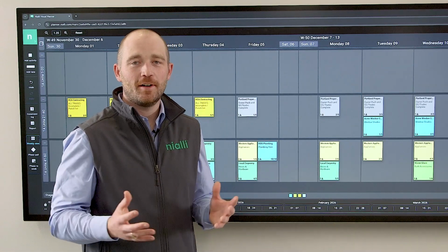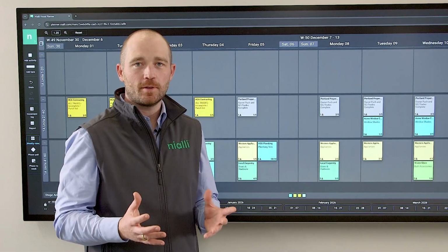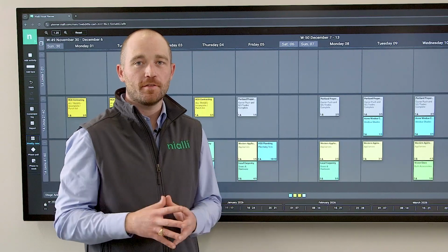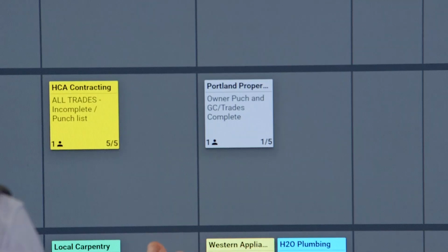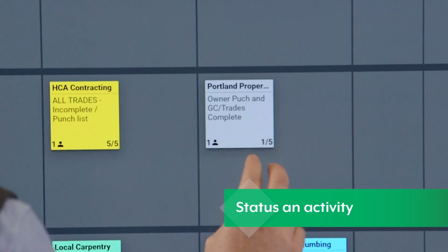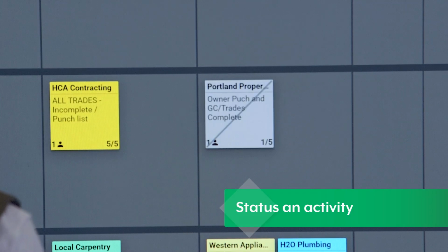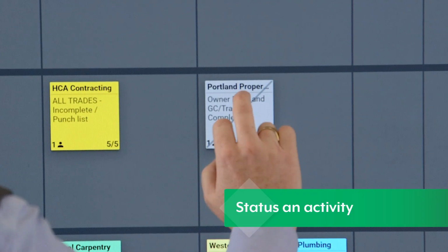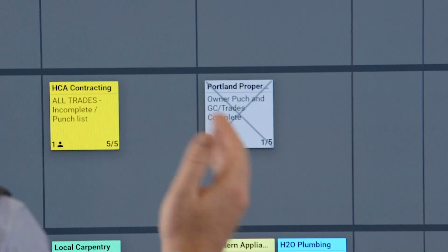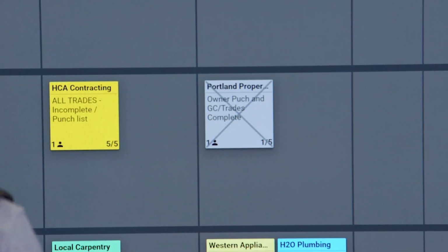The final thing to know how to do with Visual Planner is statusing your work. This is to show others if you've completed your work or not. To mark your task complete, use 2 fingers and twist to the right. A second right twist marks a task as closed, typically done by your manager or supervisor.